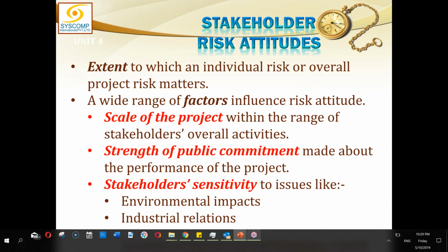Then stakeholder sensitivity to various issues like environmental impacts and industrial relations. These things, from the company's point of view, may not matter. An organization may not be much bothered about the environmental impacts and what the impact of this project is on the environment of Pakistan. But there are other bodies, maybe from government, maybe from international bodies, who will like to enforce those, and they become stakeholders. They are very sensitive about the environment or the industry relationship or something else. So those things will also form the risk attitude of the stakeholder.